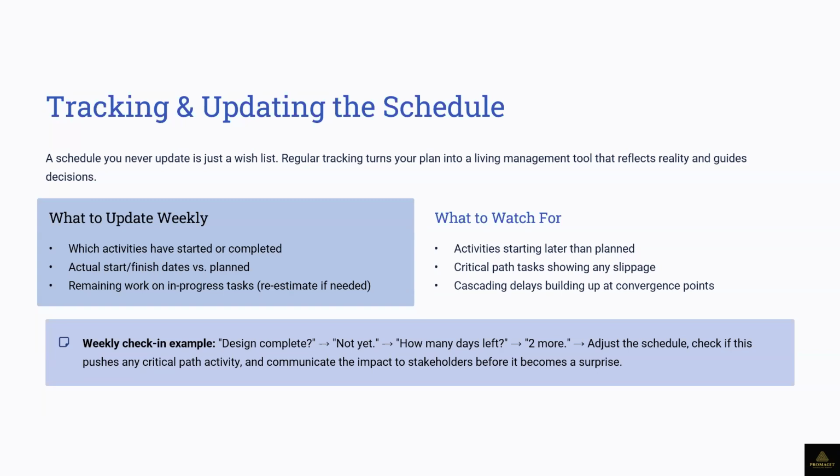That's why this scheduling job is an interesting one, because what you produce every week, they use it to weigh what you can invoice them. There's a way it works out. It's not complicated, but it's really interesting to do, because you have to produce it out of Primavera P6, and the clients will use it to update their own spreadsheet. At the end of the month, that's the invoice you're going to send to them. You have an expectation of it. On construction jobs, it's a very special thing.